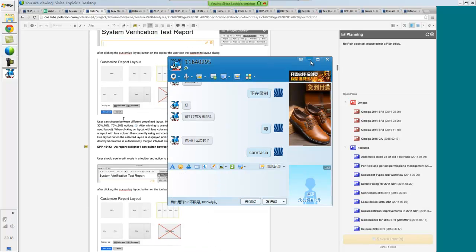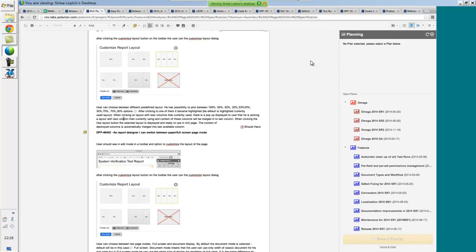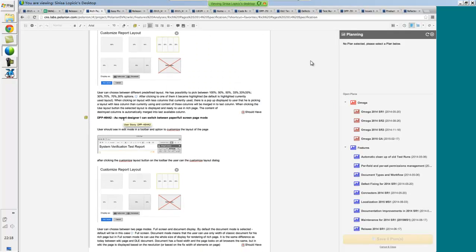We have a number of epics related to the features. We have a number of discussions and changes in how we do this. With the Rich Pages project, for instance, we try to have multiple epics, as we do not want an epic that spans multiple milestones.